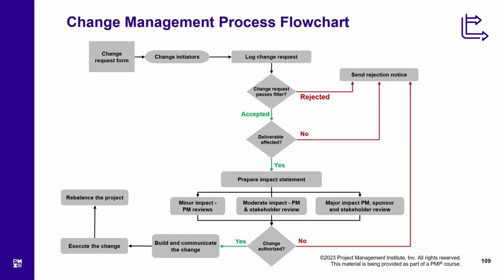But if it exceeds a specific escalation level, then it is a major impact, and not only the project manager and sponsor, but the stakeholders also review it, meaning the whole project board sits down to make the decision. So we have divided the responsibilities according to the level of impact. Smaller impact is handled by the project manager alone. Medium impact is handled by the project manager along with the stakeholders, and major impact would be handled by the